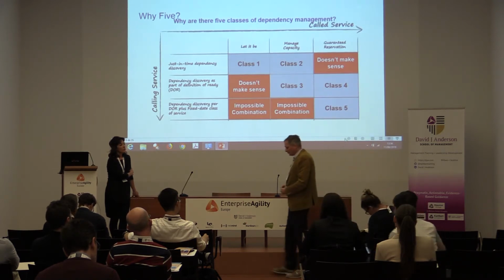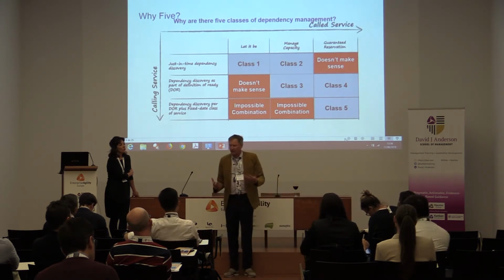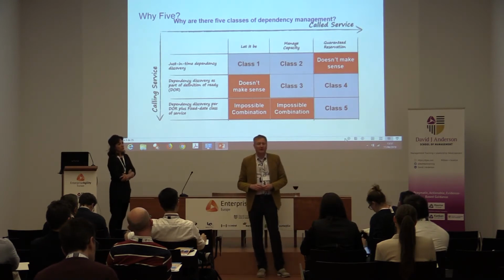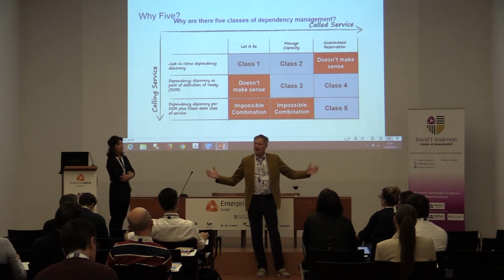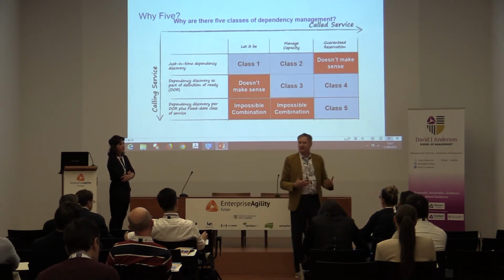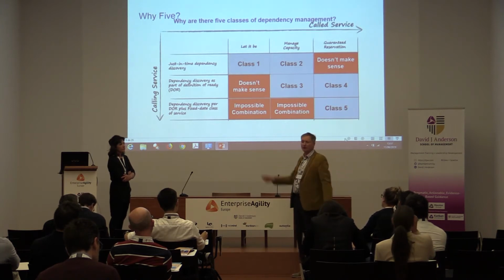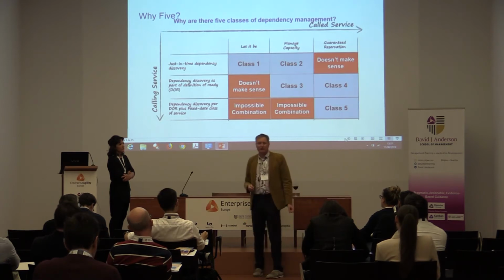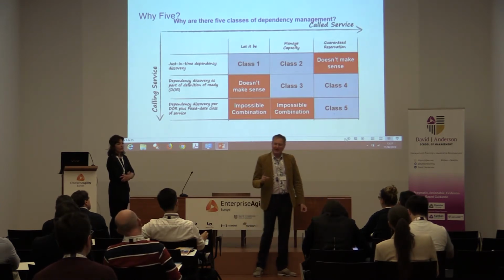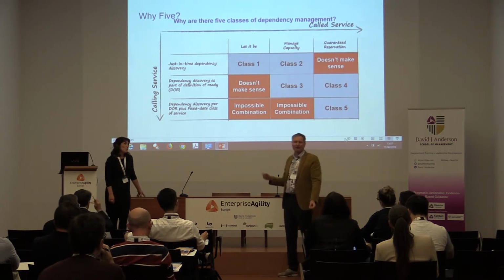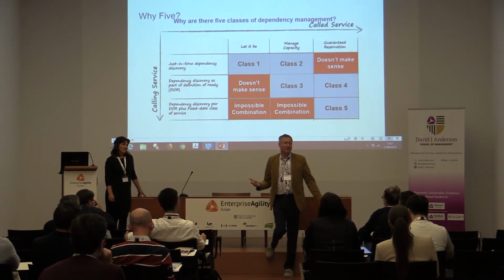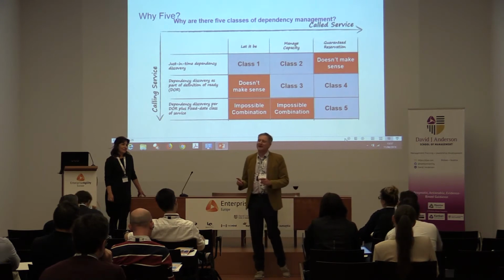Now, one company we know from around Europe, Poland and Austria and some other parts of Europe, they fly about 500 people into Frankfurt once every 3 months, and they rent space in a big hotel's banqueting room, and they have them talk about all the work they've planned for the next 3 months and figure out the dependencies and stick them all on the wall and join them all with pieces of string. Cost €2 million. How long do you think the plan they've made with all the bits of string joining the dependencies, how long do you think that survives? 2 weeks. Yeah, 3 or 4 days, quite possibly, before someone discovers a dependency we didn't discover.